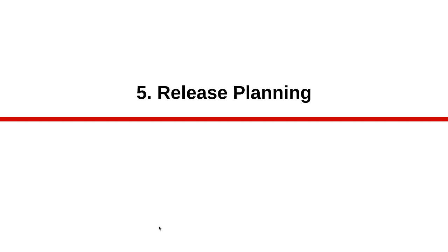The planning you do is, of course, each sprint. It gives you an idea of whether what you currently have put into the sprint backlog may or may not be too much. So you can count the story points in there and see whether it's roughly the same as in the past. It's okay if it's a bit higher, it's okay if it's a bit lower, as long as the next additional item doesn't make it just too big.